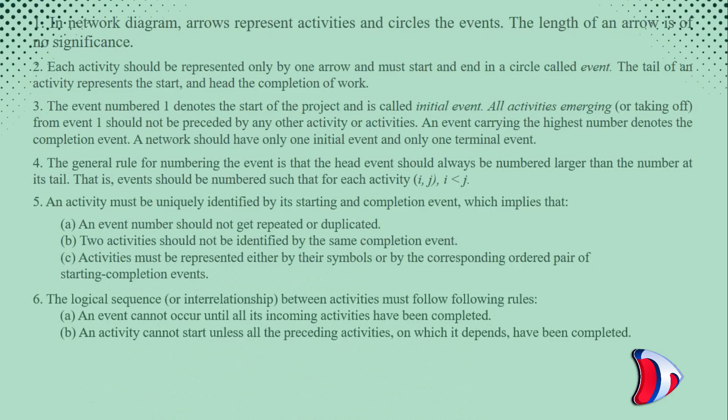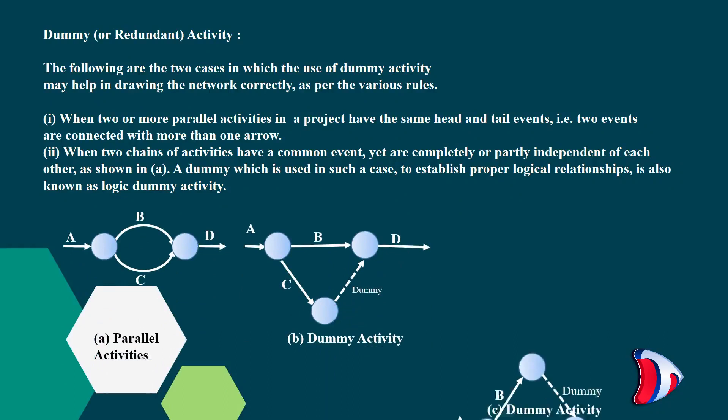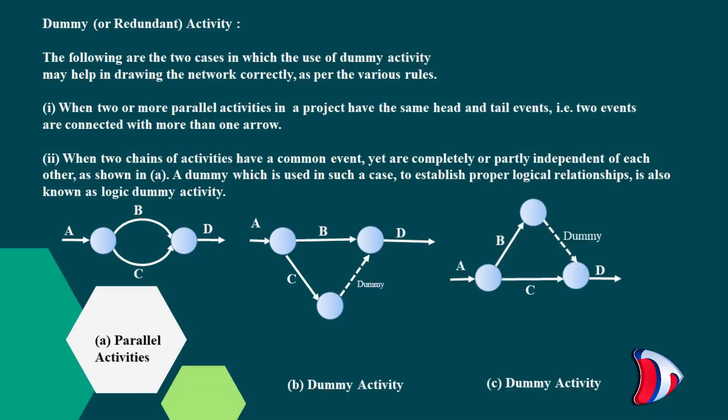Dummy or redundant activity. The following are the two cases in which the use of dummy activity may help in drawing the network correctly as per the various rules. First, when two or more parallel activities in a project have the same head and tail events. Second, when two chains of activities have a common event yet are completely or partly independent of each other.